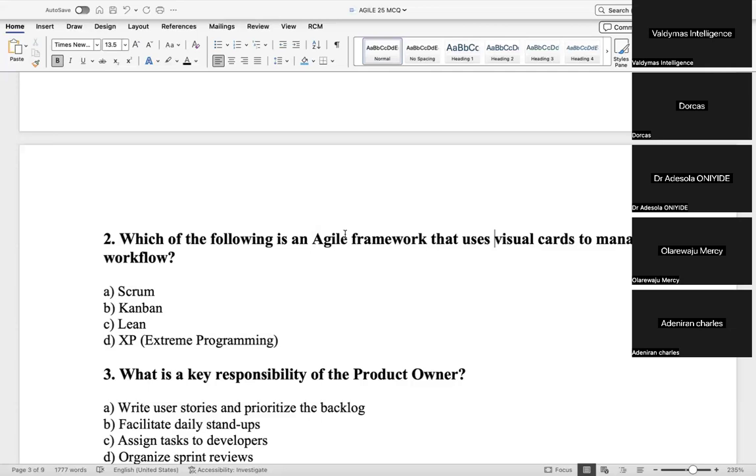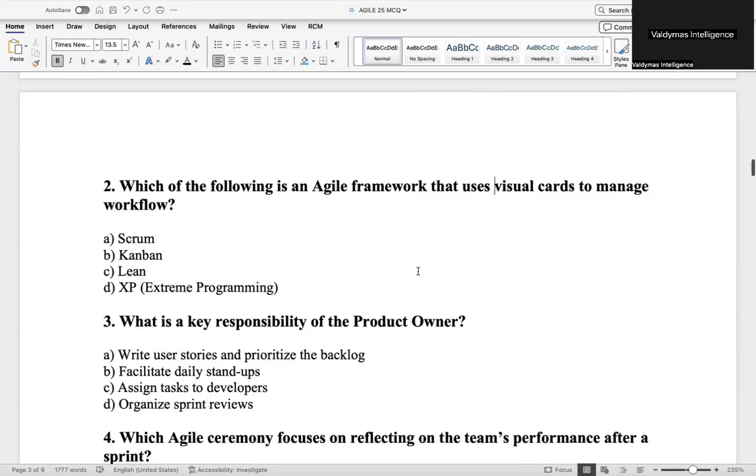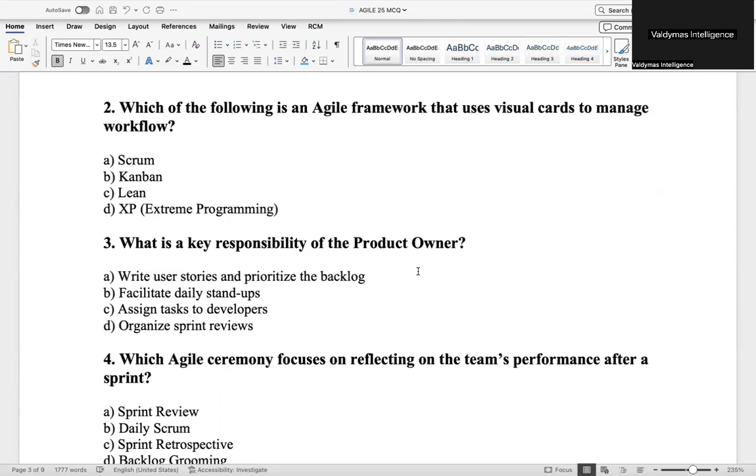Number 3 is the pull approach. They go to the backlog to pull, and they ensure that they finish what is in progress before they move to the next pulling. Number 4 is that because they pull like that, there's continuous workflow improvement. And number 5 is continuous delivery. So indirectly, I've explained Kanban to you that way. Those are just the 5 classic things you need to know about Kanban.